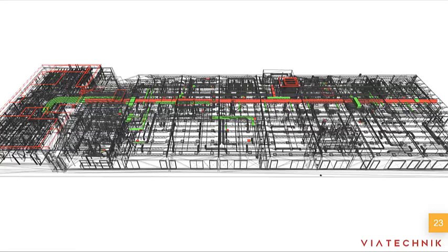Now, an important part of design and construction stages is what we call the BIM coordination process, during which a 3D model of the architectural, the structural, and all the MEP systems is created and reviewed with the whole team to find design and constructability issues and clashes between all the trades.